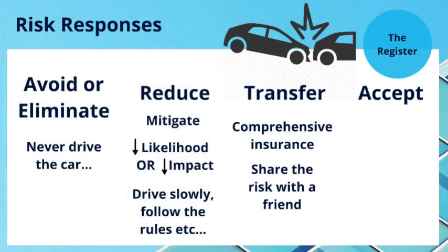The last option is just to accept the risk. Maybe you don't have the money for comprehensive car insurance, or maybe the policy costs more than the car is even worth, or maybe you're just a really careful driver. In those cases, you're probably just going to choose to accept that risk.